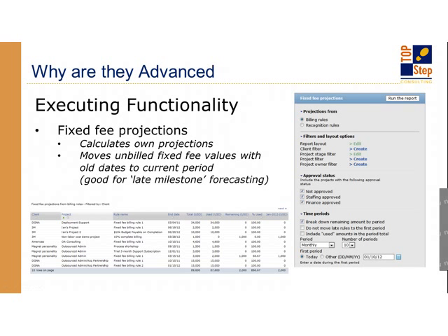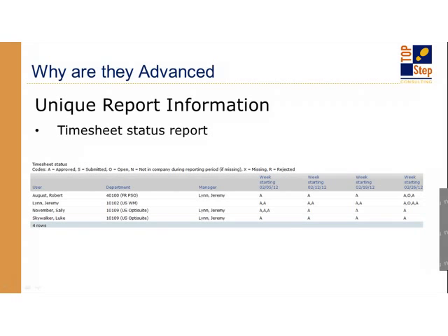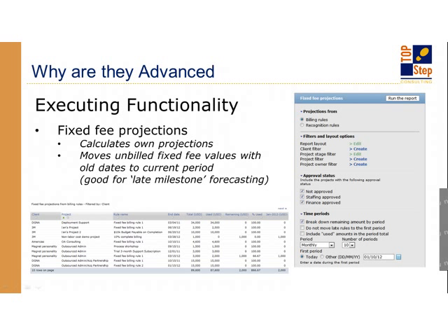So I can see on this line item here, and I apologize, it's a bit small, that the total is $3,000 US. The used amount is $2,000. I have a remaining of $1,000, so I have a percentage used here. My apologies. So I can see if any portion of it has already been billed, and also do some projections on that.